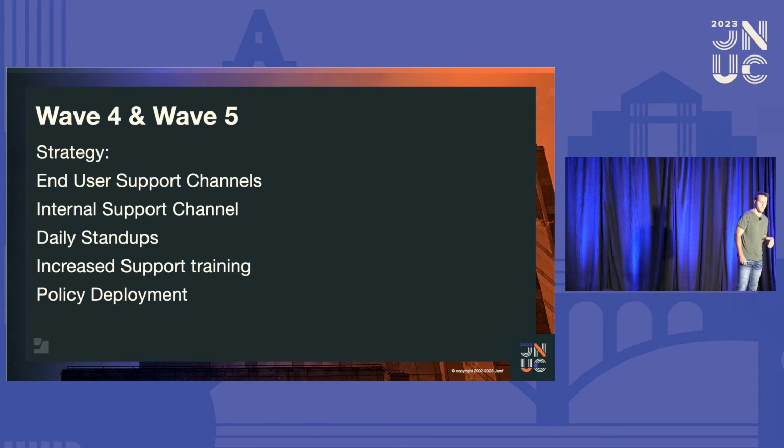The other thing to highlight here was we had better trained staff. The new hires in Wave 3 are starting to handle the simple requests and issues, creating breathing room for myself and the IT support team. Let's be honest. Bringing contractors in on Wave 3, useless. Absolutely useless. They knew nothing about Jamf Connect. Wave 4, they started to get it. Wave 5, they handled those problems for us. That meant I didn't have to handle those problems.